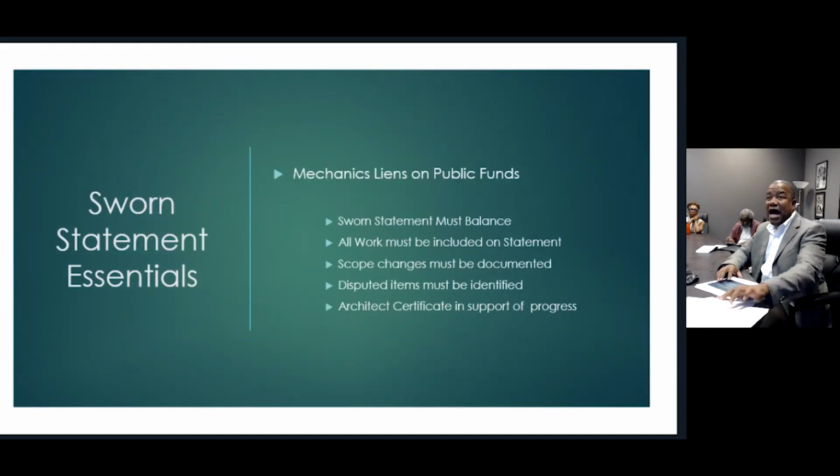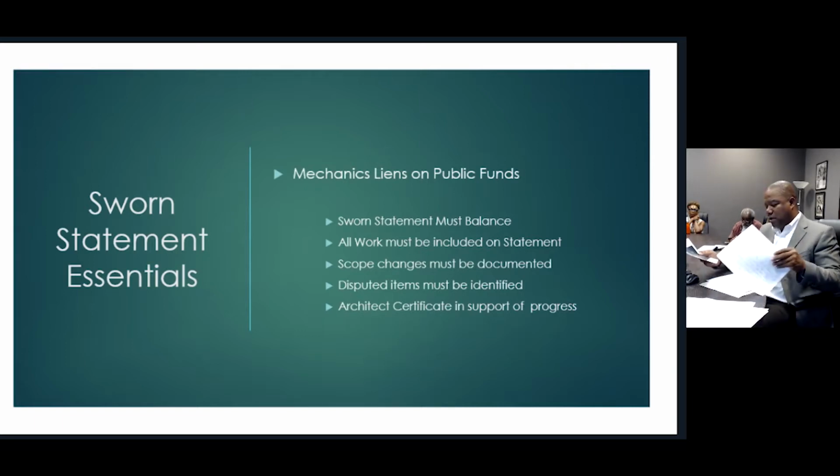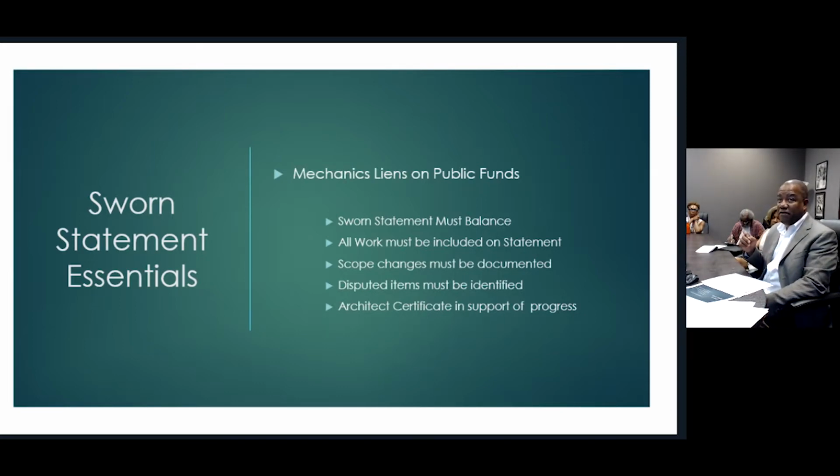Sworn statement essentials. Some of the same things that you saw on the private side, you see on the publicly funded side. The sworn statements must always balance. I don't care what side of the fence you're looking at, private or public, these statements must balance. If you're not good with math, use a spreadsheet.